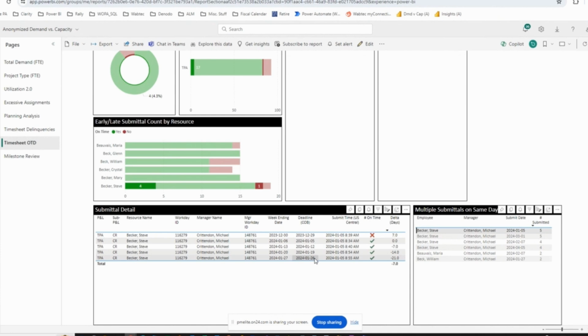Well, okay, if Steve's going on a long vacation and he knows he's going to be charged into the vacation code for the next 3 weeks, okay, that's a legitimate situation. But what if he's not? What if he's just trying to get an annoying paperwork exercise out of the way by submitting his timesheets for the next 4 weeks now, so he doesn't have to be bothered by it? Well, he's looking into his crystal ball. He's projecting what projects he's going to work on and what tasks and how many hours he's going to work on for each one. And hopefully he's right, but what if he's not?